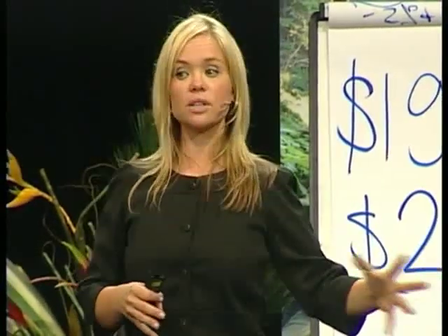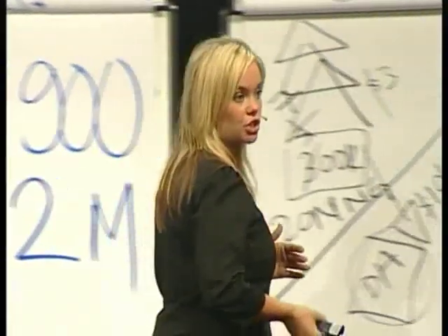Now we have to start selling. Although selling is the last point, it should actually start at the beginning. Because if you haven't sold by the time you've finished, then you're going to still have to pay extra interest. Even though they're lending you the money for the interest, you've got to pay it back at the end out of your profits. So you want to try and have all your sales done by the time you've finished.